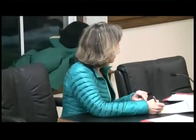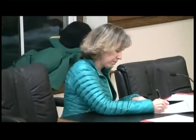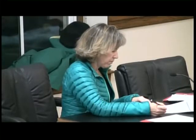This 68 was something Lou discussed during the meeting, and we have included in other, I don't know if I worded it right, I tried, I would suggest that instead of should, you should put shall. Shall. So that's just, the project owner shall inspect and submit reports confirming the engineered slopes and fill are built in accordance with the plans approved and referenced herein.